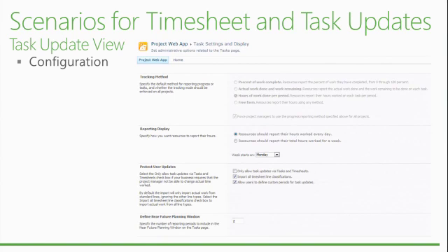Right, that's what the document says. And then, allow users to define custom periods for task updates. Yes. But you probably wouldn't be doing task updates in single entry mode, right? Because you're just entering via the time card? No, single entry mode does task updates, but it uses the time you enter in the timesheet to populate the task updates. That's the purpose of single entry mode. Okay.